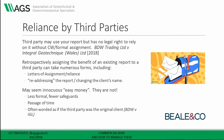Let's now consider another common scenario in which contracts with third parties are created. This most commonly occurs where consultants have completed a report or some other work product for their original client — could be the original landowner, for example — and are later asked to assign the benefit of that report to a third party, such as a developer purchasing the site. Without a collateral warranty or some other formal assignment of the benefit of the report, a third party may read your report and make use of the information it contains, but they have no legal right to rely on that information and bring a claim against you if it's wrong and they suffer a loss.